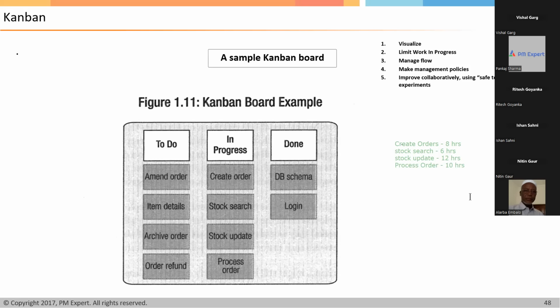Can you note down these points through a watch? Yes. Right? Now, what is the average of this? Total is 36 and 9. Right? So can I say average cycle time will be 36 by 4, is equal to how much? 9 hours. Right? Yes or no? Yes.